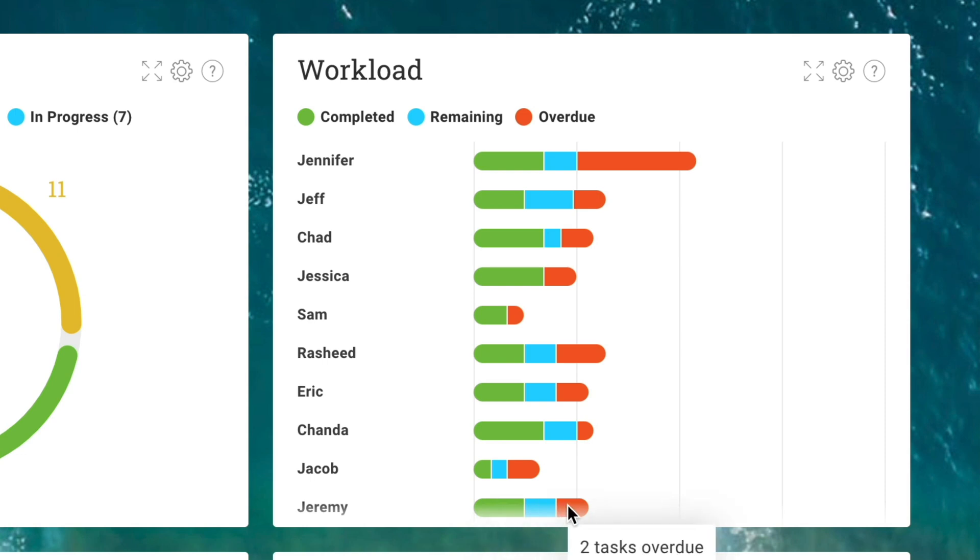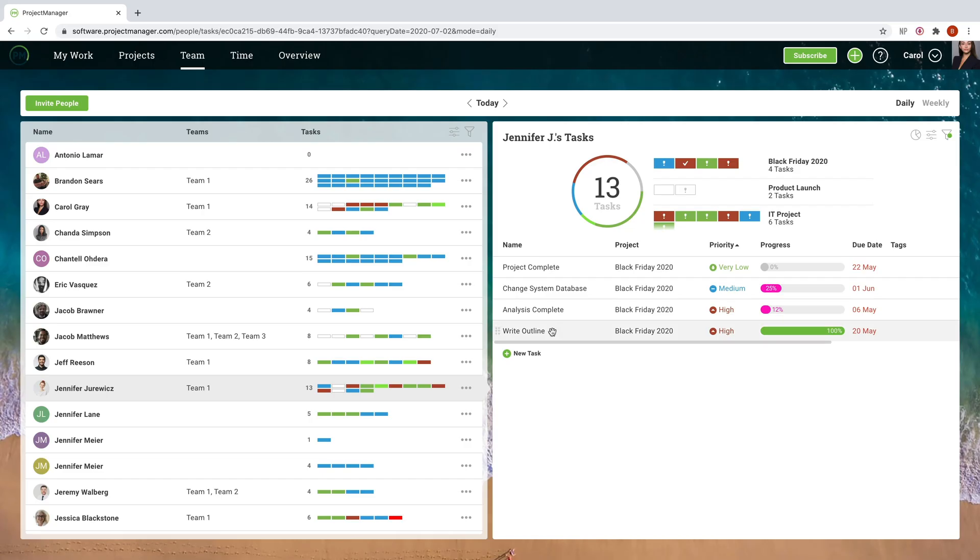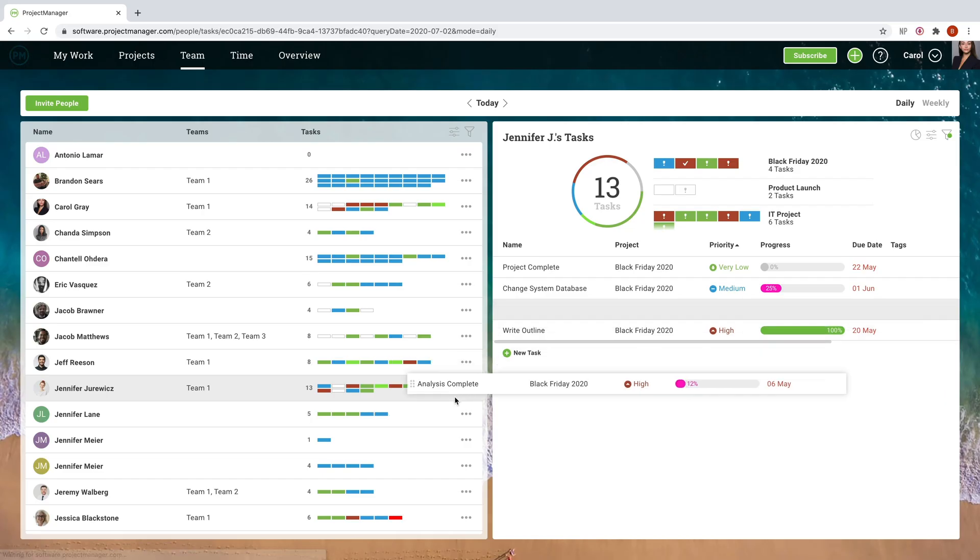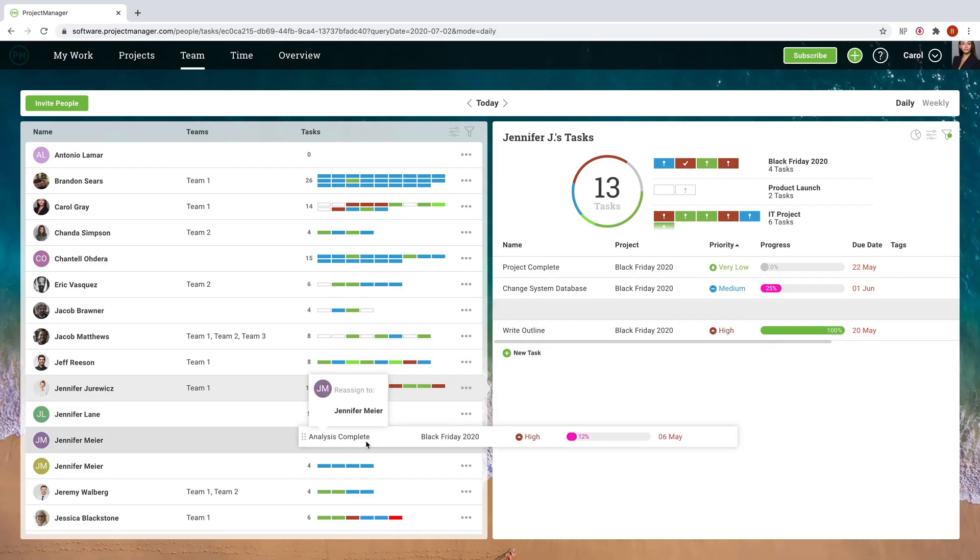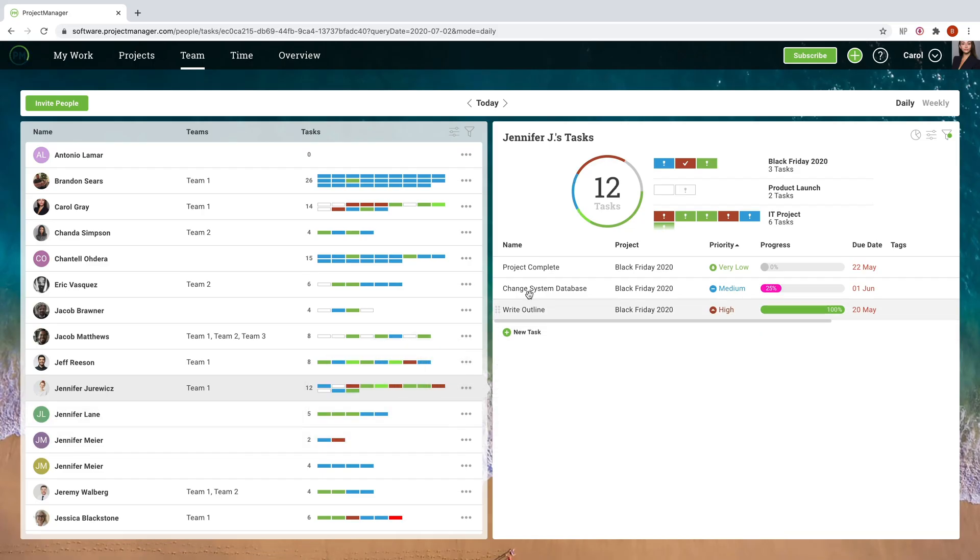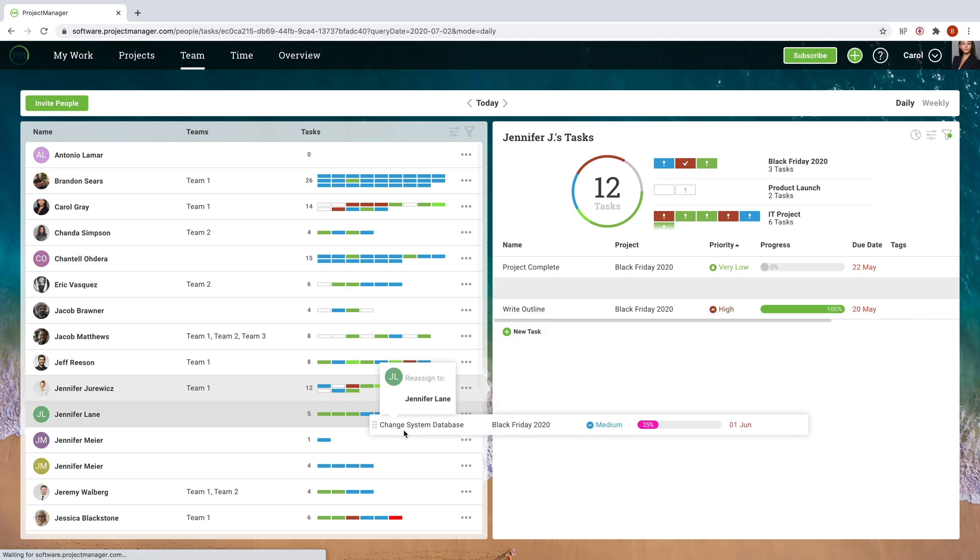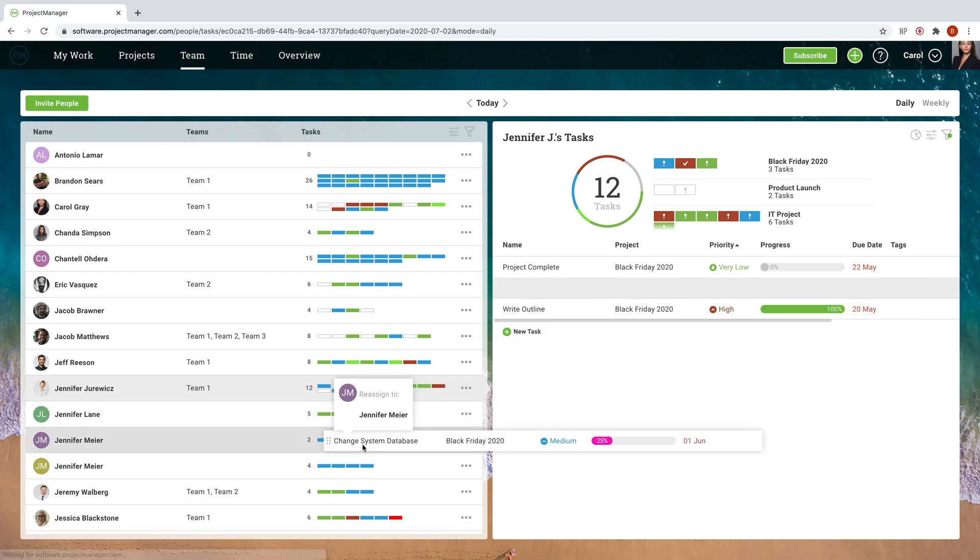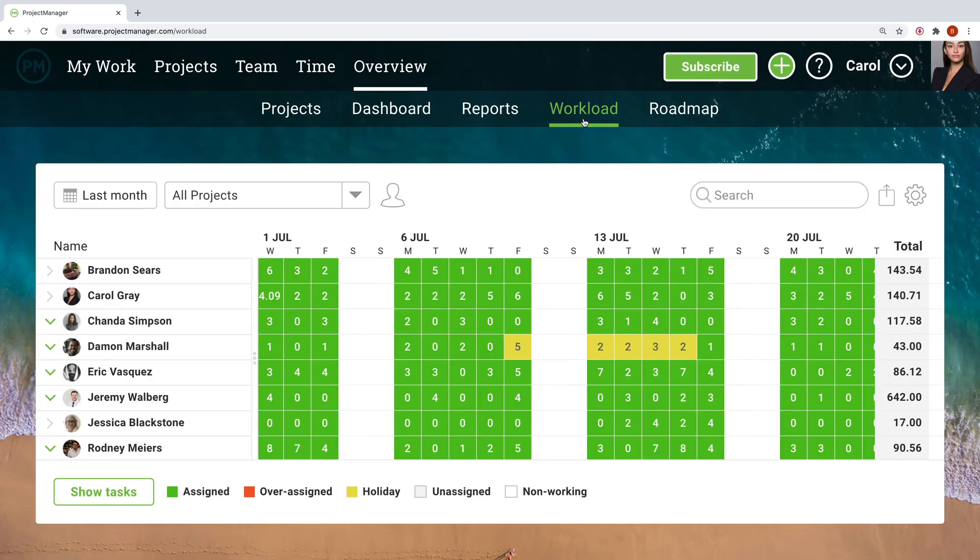When addressing issues like workload allocation, sometimes the solution is as easy as dragging and dropping tasks to reassign them to other people. You can even schedule resources well ahead of time with the workload page, which syncs with the Gantt chart and other views.